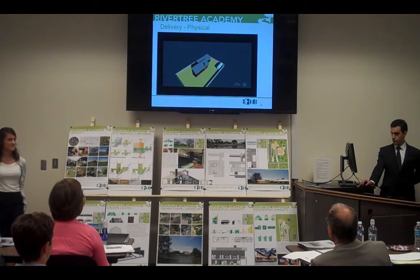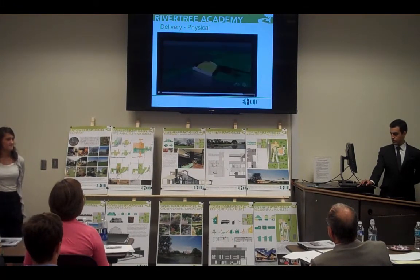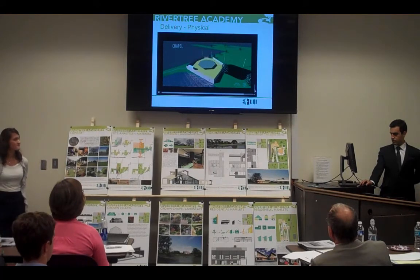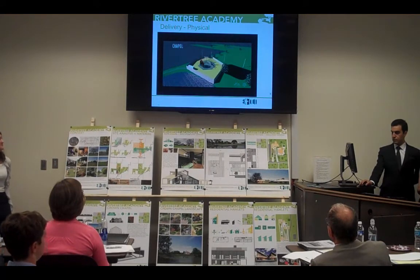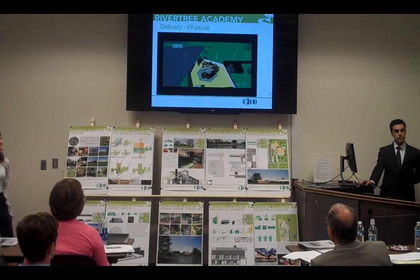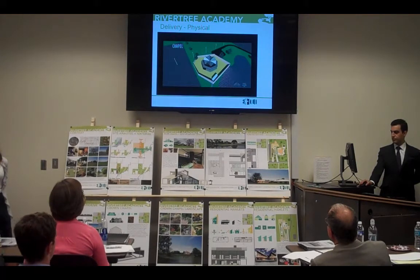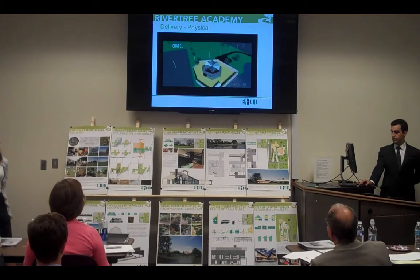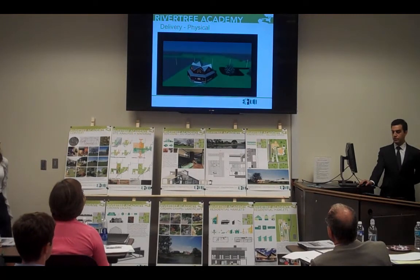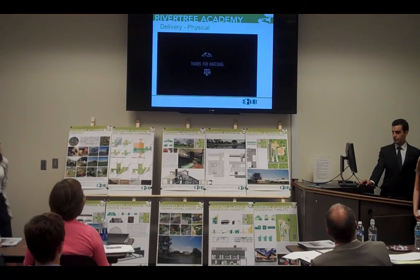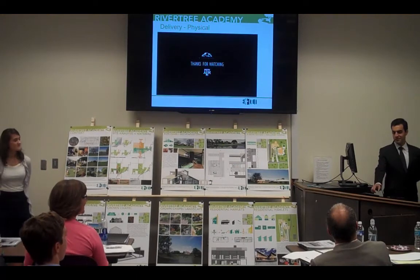The construction sequence for the central chapel is as follows: slab on grade, column system, roof trusses, exterior wall panels, roof decking, interior walls and floor decking, and finishes. My name is Sima and I'm from Iran.